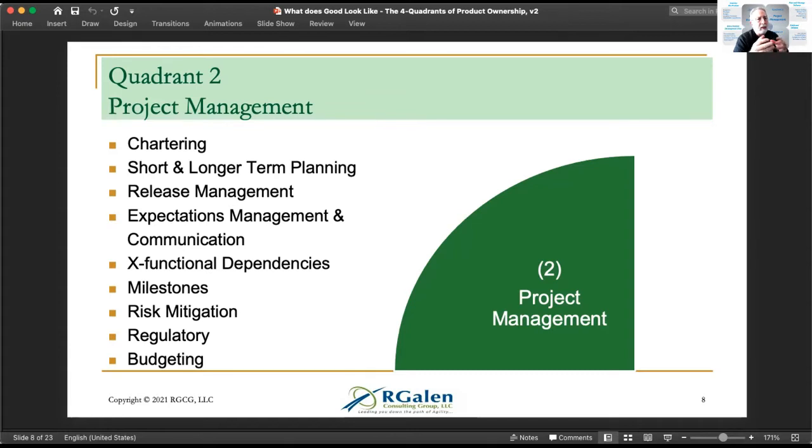One of the things that I see a lot of value in is a scrum of scrums. If you've ever seen a scrum of scrums as a synchronization point, one of the key attributes is the communication from team to team, across product owners within themselves, and then across the team. Managing dependency, that's the wrong way. Maybe identifying dependencies, making dependencies transparent, making them visible. Management sounds like you're managing them. I'm not meaning to imply that, but you're making them visible and transparent to the teams and inspiring them to coordinate those dependencies amongst themselves.